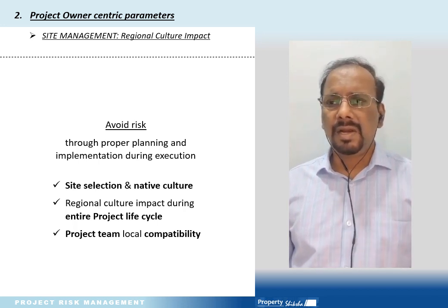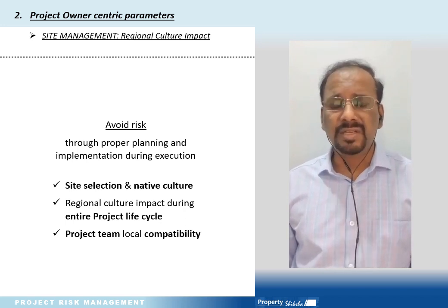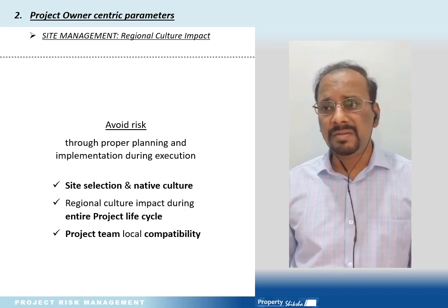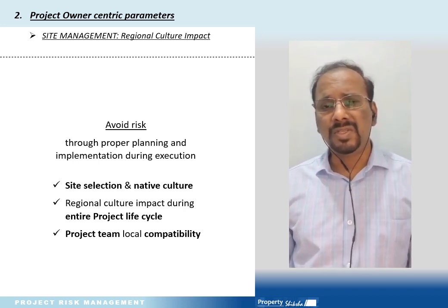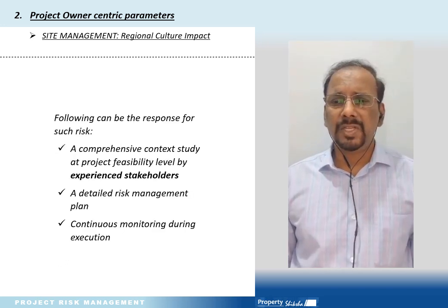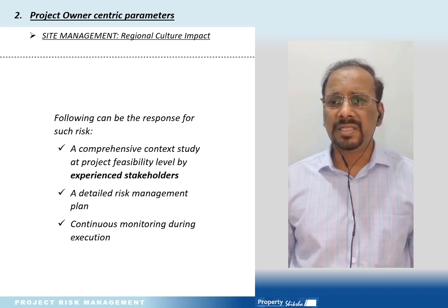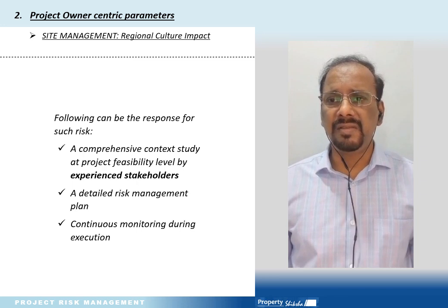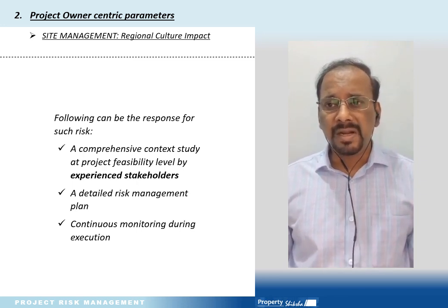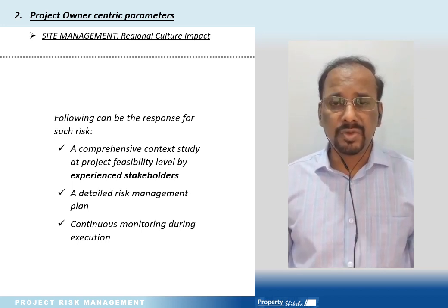The other thing is compatibility, where construction vendor selection or onboarding and project owner management team finalization should be done on the basis of local compatibility. The response for such risks includes a comprehensive context study at project feasibility level by experienced stakeholders, a detailed risk management plan, and continuous monitoring during execution for such risks.